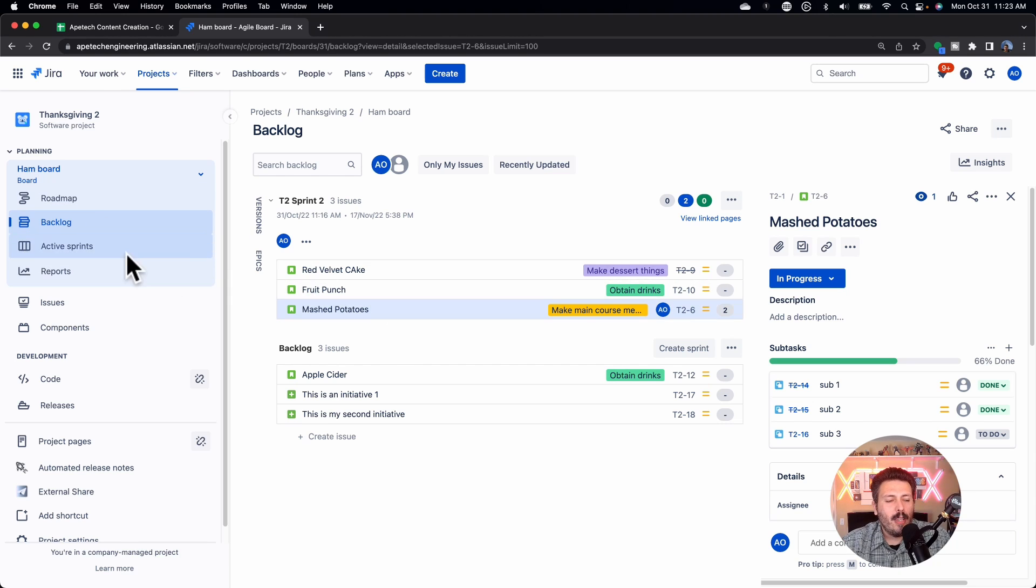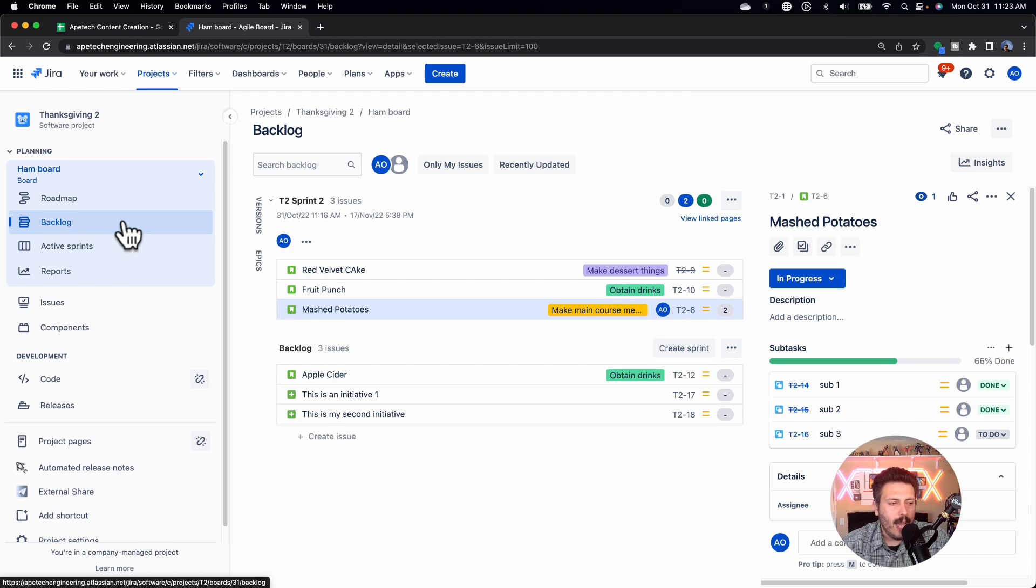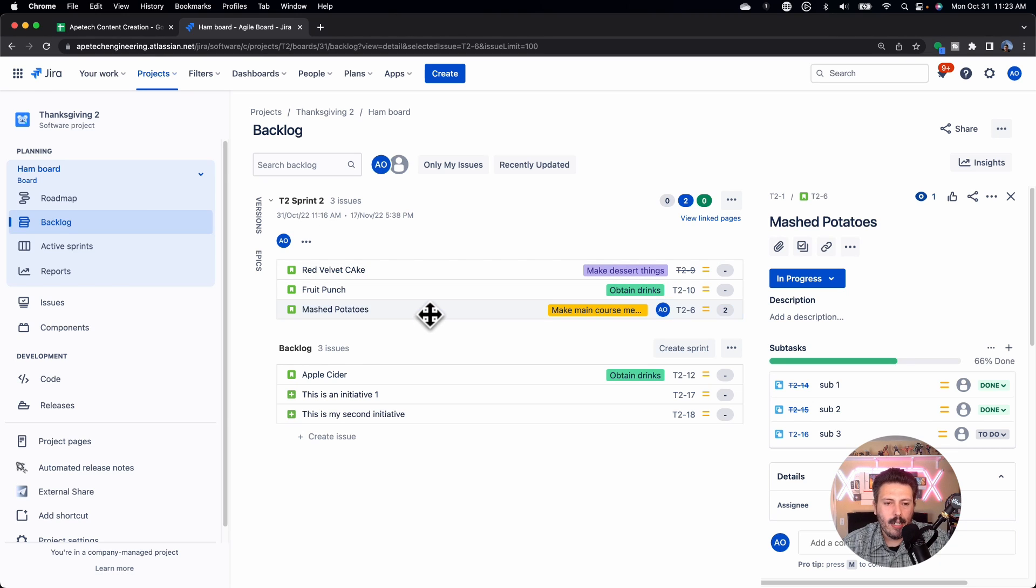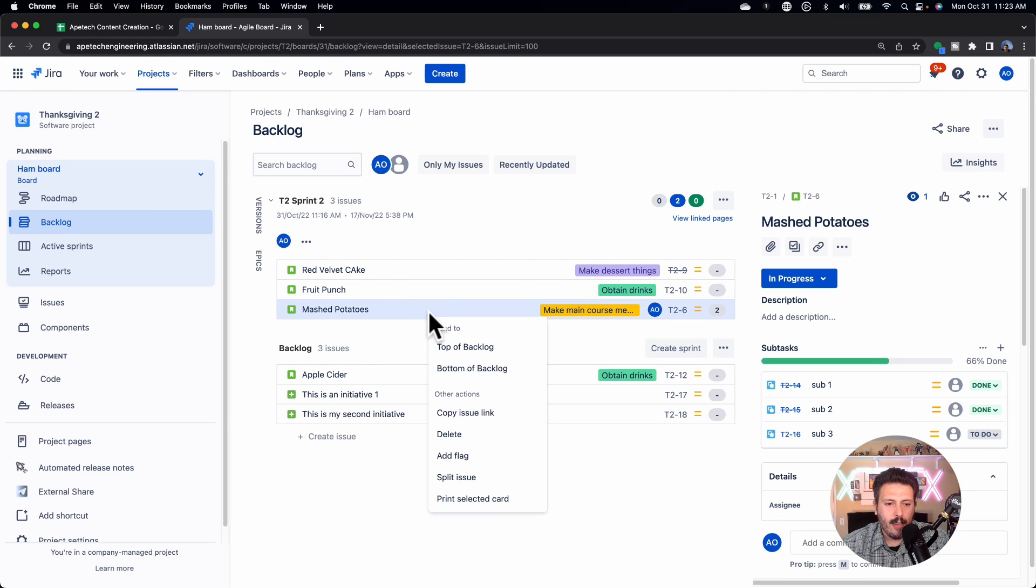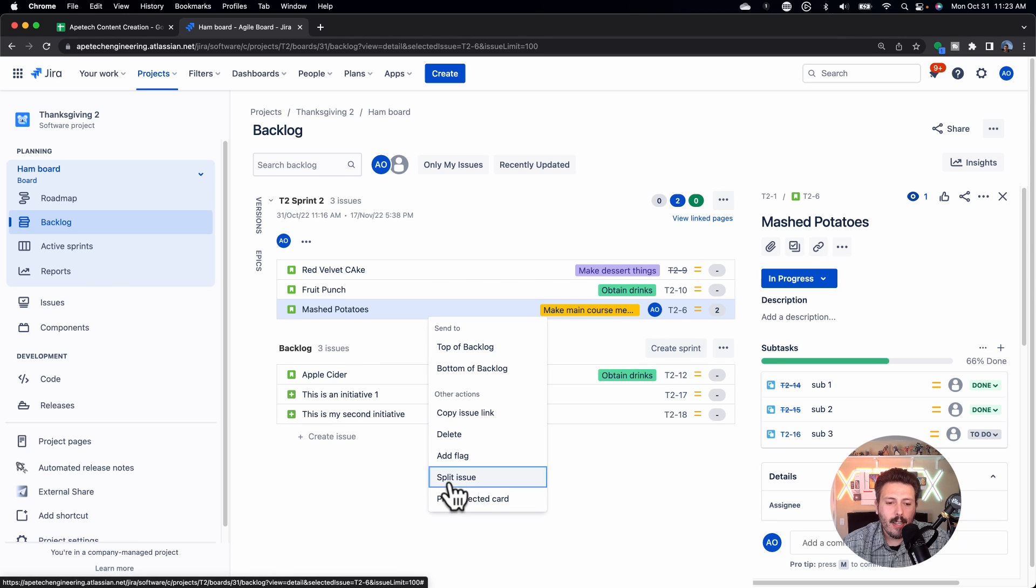So how do you split a story? Well, the easy way, and you have to be, I repeat, you have to be in the backlog. This will not work in the active sprint view, you have to be in the backlog, and you're just going to come to the issue that is of interest. You're going to right click on it. And down here, you will have the option to split your issue. But when you click on this, you'll be presented with a window.